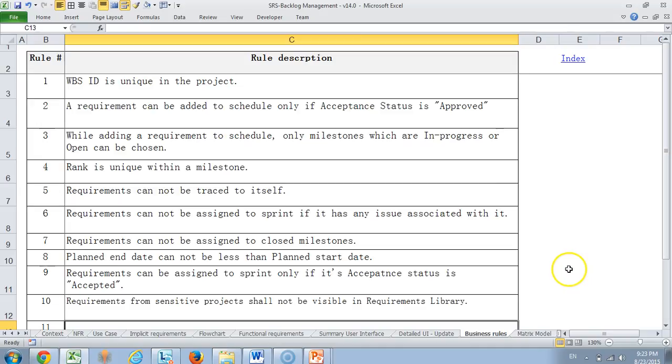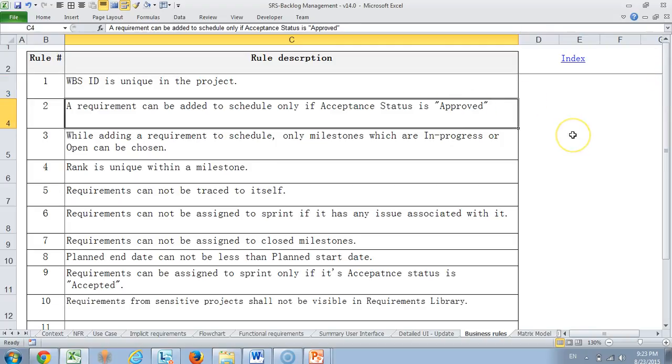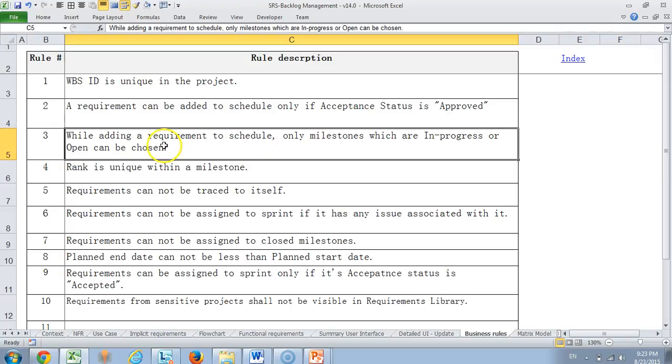Then we come to the business rules. These are the rules that we would like to be implemented when the system is being followed. For example, a requirement can be added to schedule only if acceptance status is approved. Unless a requirement is approved, we don't want to take it to schedule. Similarly, while adding a requirement to schedule, only milestones which are in progress or open can be chosen because a requirement should not be assigned to a closed milestone.